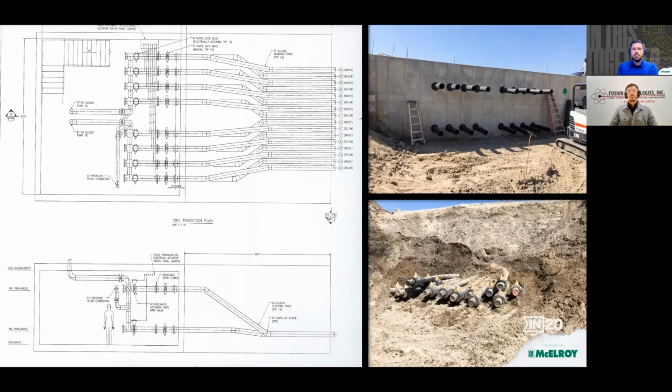So we planned that this would take about 5 working days on site, and it was a day of travel each direction. We'd have to leave on Sunday morning early, and then we'd return home the following Saturday. It's about a 10 or 11-hour drive from Billings, where our headquarters is, to Wahpeton, North Dakota.